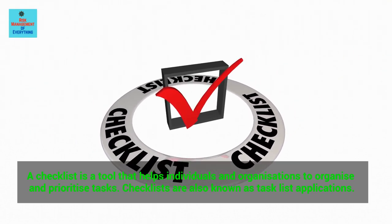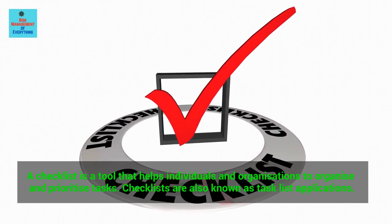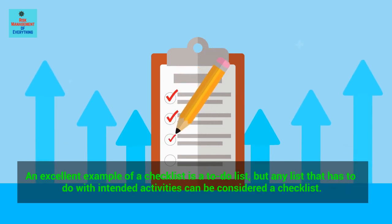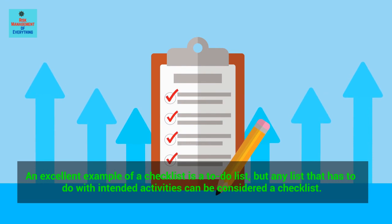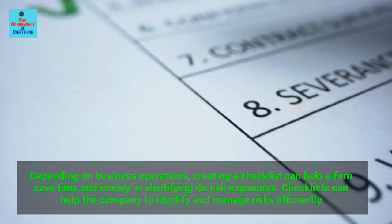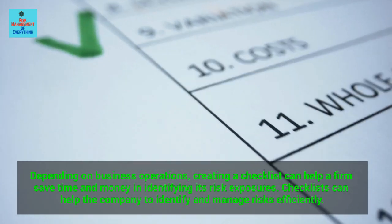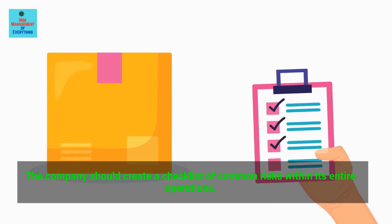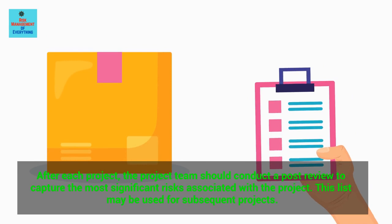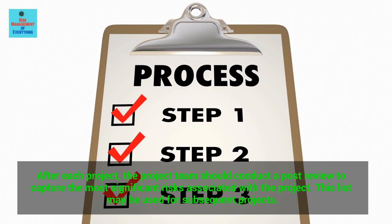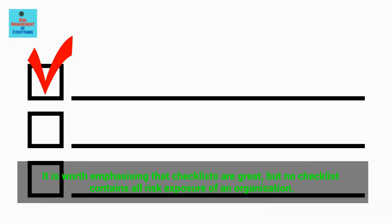Way 13: Checklists. A checklist is a tool that helps individuals and organizations to organize and prioritize tasks. Creating a checklist can help a firm save time and money in identifying its risk exposures. The company should create a checklist of common risks within its entire operations. After each project, the project team should conduct a post-review to capture the most significant risks associated with the project. Note that no checklist contains all risk exposures of an organization.